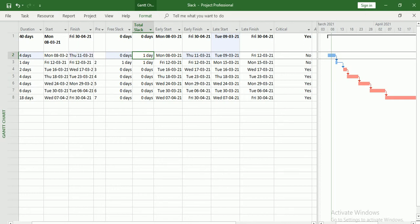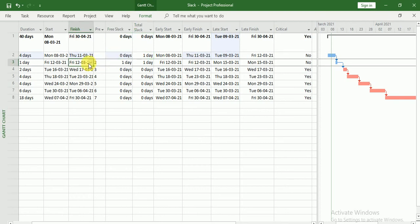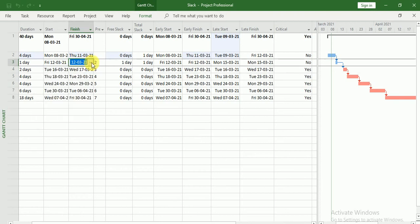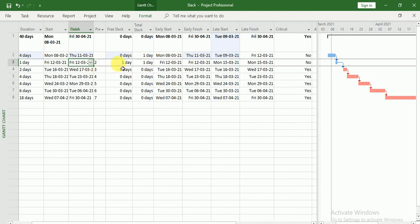So try to understand Free Slack and Total Slack. Free Slack means the time by which we can delay a task so that our next task should not be delayed. This task we can delay by one day only so that our next task will not be delayed. Suppose if I delay it by one day, that means 13th, then my next task will not be delayed. But if I delay this task by two days — since we have free slack equals to one — then my next task will be delayed. Total Slack means we can delay the task by one day only. If I delay by two days or more, then my project finish date will be changed.